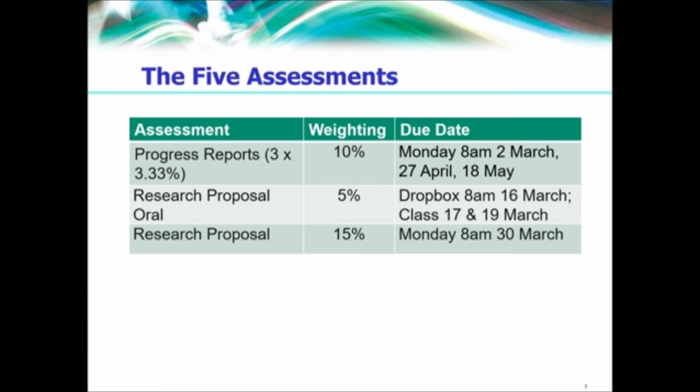Be aware it might take several weeks to get your project approved, so you need to factor in lots of time while you're waiting for literature review, for writing approval forms, for building data collection tools, for refining your methodology and starting your research report. You need to aim to start your data collection around week 10, but that doesn't mean you can't work harder and faster to get approval earlier. This delay also doesn't mean you get a holiday. It means you start gathering academic literature and preparing your final report straight away.